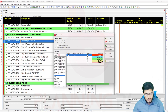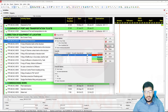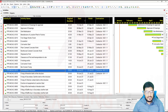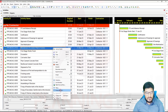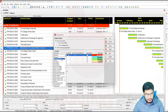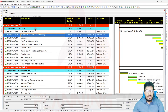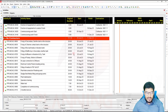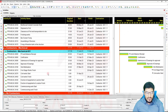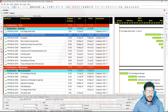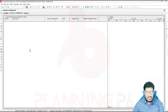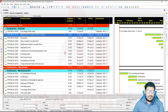If the client or your top management wants to see or review the performance of the contractor, you can manage by grouping and sorting. After assigning once, throughout the project you will just apply the Group and Sort. After grouping and sorting you can see — now I will go there and apply 'Contractors.' Apply and OK. You can see now — no contractor has been assigned for those activities. If you assign them, they will fall under whatever grouping and sorting you set. For resource assignment, I will clear the filter — there is no resource assignment.